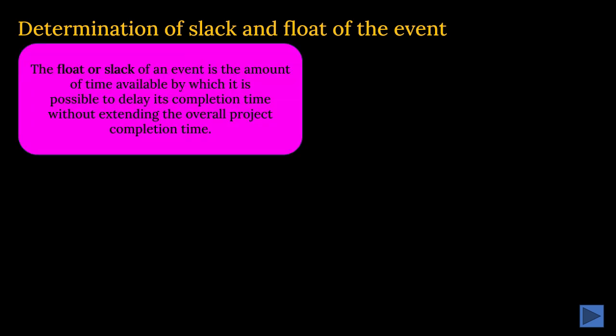Now we have discussed the slack and float, and now we'll discuss that. What is that? The float or slack of an event is the amount of time available by which it is possible to delay its completion time without extending the overall project completion time.